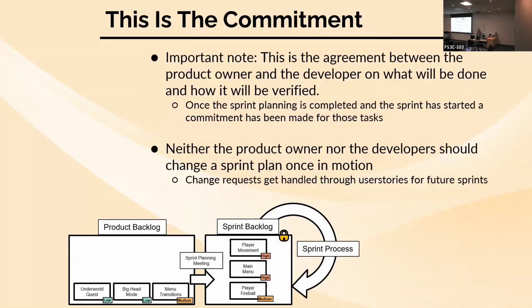All right, important note during this process though, especially for agile development, this is where commitment comes into play, right? The product backlog has no commitment, right? You're not making a commitment for things happening in the game by being in the product backlog. Once you put things into the sprint backlog, you estimate it, assign it, and then the sprint plan has been approved by all stakeholders. Now we have made a commitment to getting that inside of the product. Right, and we made a commitment to getting that in the product in the way that we said we were going to get it inside of that product,